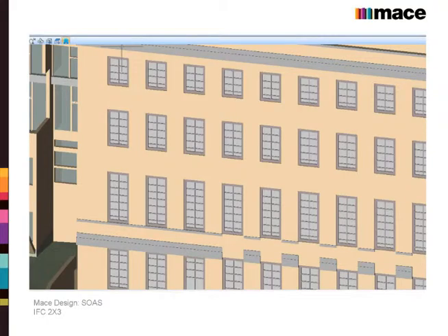So we acknowledge it. Another thing that we've noticed is, as a QS, the design team can use multiple platforms. You can use Autodesk products, you can use Bentley products. Because of the sheer amount of information that comes our way that we look at and coordinate in our minds with our experiences, with our measurement rules, we have to work in a platform that reads everything. So we generally ask for an IFC as well.